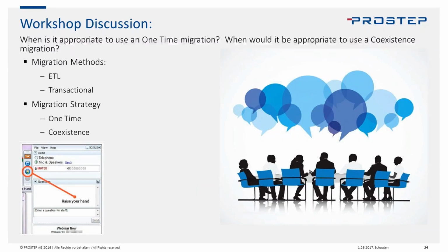So conventional migration, I think most people think of ETL, and if you have a small set of users and you have a small set of data, that's probably best targeted towards an ETL migration. But if you have a more complicated enterprise with a large user community and not everything is worked out or working well day one, then I would steer towards a coexistence. But yeah, for small communities, small data sets, definitely one-time migration is the way to go.